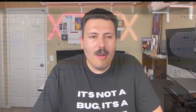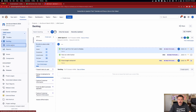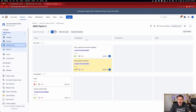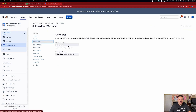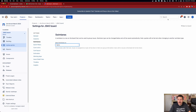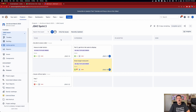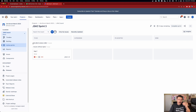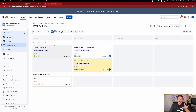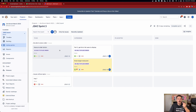When we go over to the active sprint board, another cool way to look at this is you can go to your board settings and change your swimlanes to be based off your epics. So if you're looking at your epics and stories correctly, you can now see — by the epic, by the functionality or capability your team is trying to deliver — here are my stories related to that epic. You can collapse it and show all the epics your team is working on. You don't update the epic in a sprint — it's all about the stories, tasks, and bugs at that point.